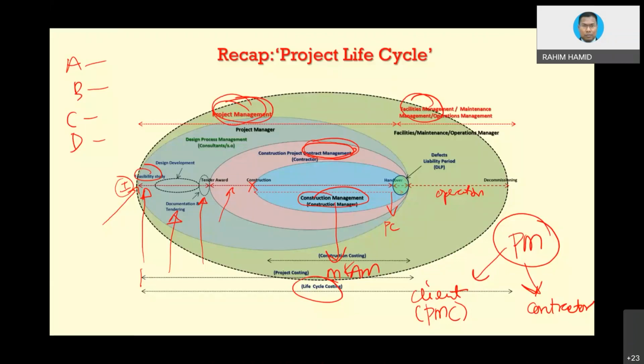At the end of the day, perhaps if we develop project A, it will cost us simply 100 ringgit per day. Let's simply say that. This one is 110. This could be 120. This could be 95 per day. We end up like that, for instance. If we have a complete set of analysis there, then we can make a better decision. We go for D, for instance, because over a long period of time, we can save more. Okay, we can save more. That is the concept of project life cycle.